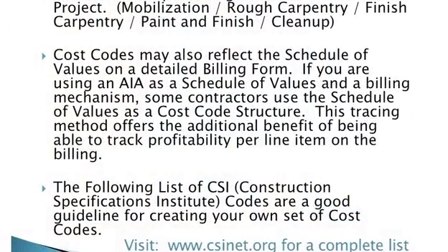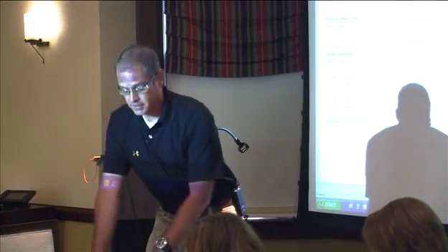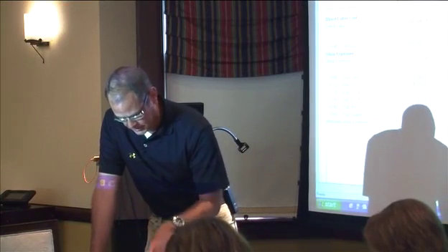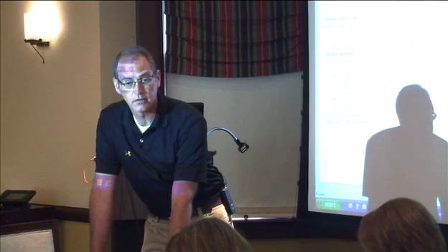If you're not familiar with what cost code structure is, guys, it can be very specific to your business, okay? I've included a copy of the Construction Specifications Institute, the CSI codes. These are the old codes. They now have how many divisions? Does anybody know right offhand? Like 52, 58? Yeah, there's a whole bunch more than you see here, right? This is the old breakdown. It works really well for a general contractor. But you can see that if you are in one of these particular trades, if you're into metalworking or concrete, it's a good structure at least for a start, okay?